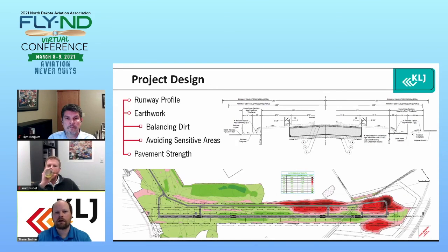That way, the FAA would be able to pay for up to the 6-inch amount, and then we had that hard cost difference for what was above and beyond, and that ended up working out pretty well. So the airport did, in fact, go forward with the 8-inch section, which was plenty of overkill to a lot of people, but looking at the fleet projections and the comfort level with the city, the county, and the airport authority, that was going to be the best bang for the buck moving forward.